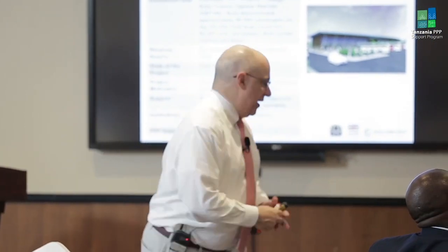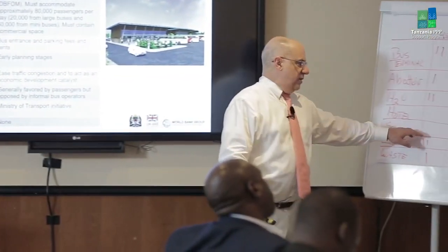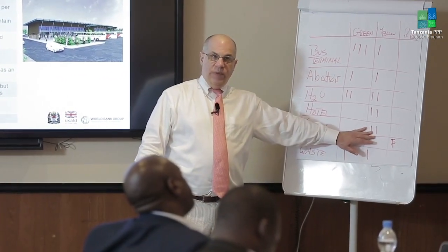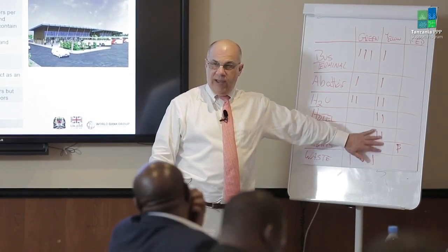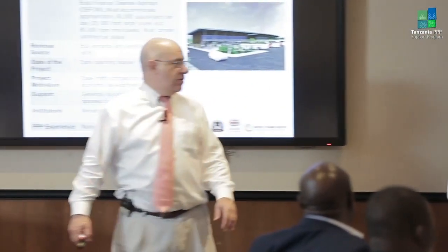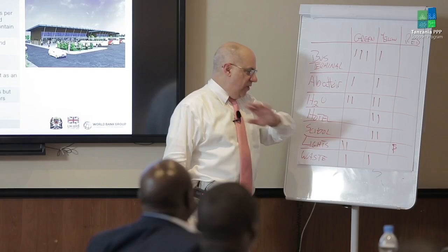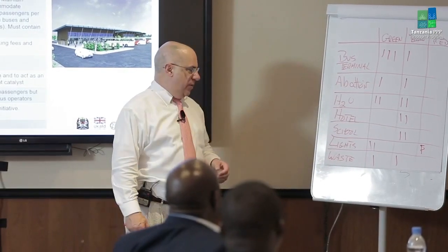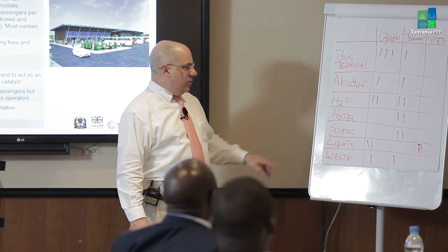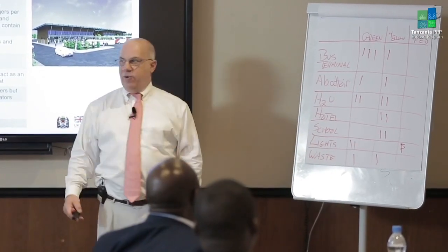What are our two modes of payment or revenue in public-private partnerships? We have user fees, and what's the other one? Availability payments. So this would likely be an availability payment scheme. As long as the private operator, the private investor, does what they're supposed to do, and the school's air conditioning is working, the lights are on, none of the windows are broken, they receive their full availability payment. This is surprising, a pleasant surprise, our street lighting project.